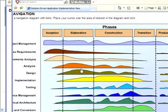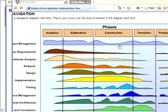The third phase is the Construction phase, where you would focus on the design, the implementation, and testing of functions to develop the complete system. This is usually the longest of all five phases.